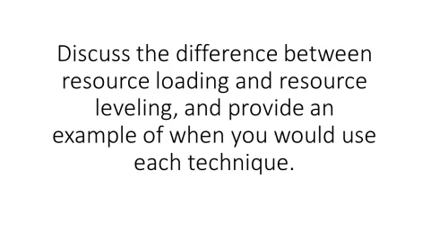Resource leveling is done first and then we do resource smoothing. First, we need to allocate the resource constraint before we can optimize it. When we apply resource smoothing after doing resource leveling, we make use of slack and it will not result in a change of project direction.